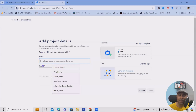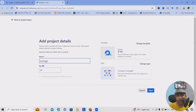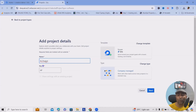Let's consider we want to build AI-based applications. I'm creating this project management setup — giving it the name 'AI Projects.' By default, it will automatically suggest a key. It always suggests a unique key, so if you change it, make sure it is unique and memorable. This key is used for automations, REST API calls, and any automation rules. After creating the project, you won't be able to update this key field, so make sure you set it correctly initially.